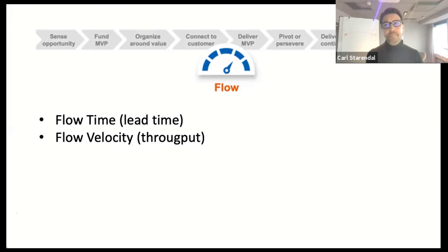But if you're looking at it stochastically, as a stochastic flow, the sizes are not infinite. They're between 0 and 10 weeks, sort of. No, they're not infinitely big. So just looking at the number gives you a lot of information. You could, of course, look at story points here, for example. We're delivering 900 story points, so 1200 is unreasonable.